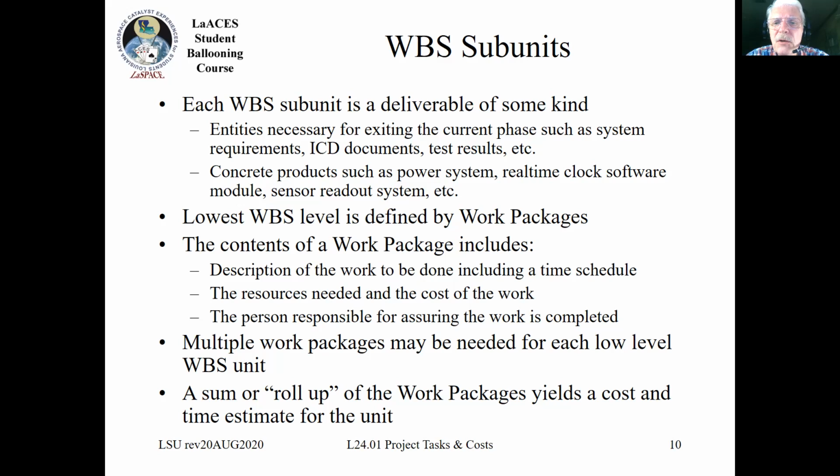That work package includes three things: a description of the work to be done, including a time schedule; the resources needed and the cost of that work; and the person responsible for assuring the work is completed. Multiple work packages are probably needed for each low-level WBS unit. If you roll up, or sum, all the work packages underneath a unit of a WBS, that gives you your total cost and time estimate for the unit.